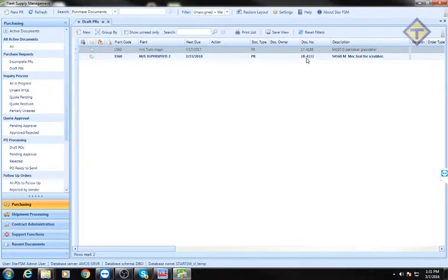Okay, so we also have some icons here when the document is locked. That means I can lock this document so people cannot do anything, so people know that someone is working on it. If an item has that flag that I was missing in IPS, called DG, a dangerous good flag, that means I probably have to arrange a special transportation, a special certificate, and so on.